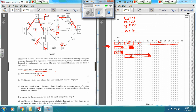F can start at 3 and it's going to take 5 days, going up to 8, but we can finish at 9 - it's got a float of 1. G can start at 9 and it's going to take 7 days, going up to 16, and it can end at 17.